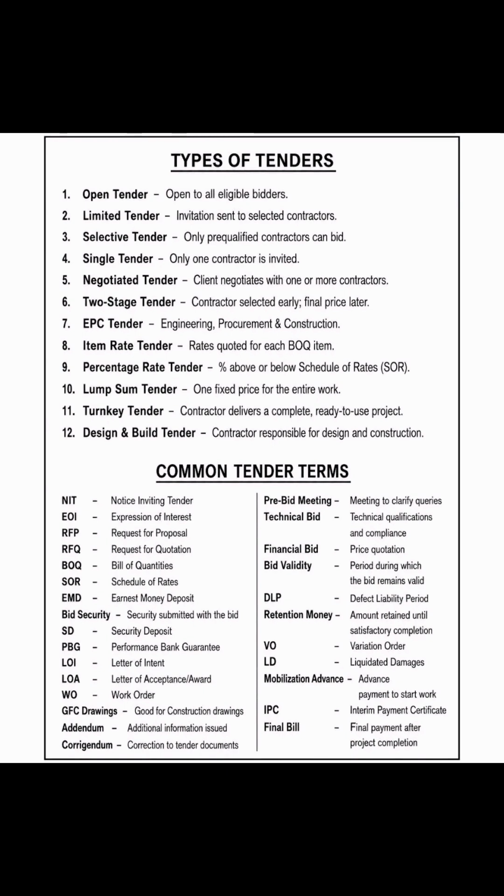Then we have negotiated tender. Just as the name implies, the client negotiates with one or more contractors. He negotiates with one, then with the other one and the other one. Then at the end of the day, he sees which of them has the more reasonable price, then he selects that particular contractor.